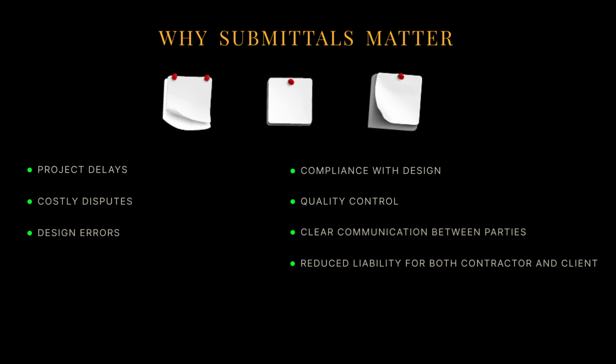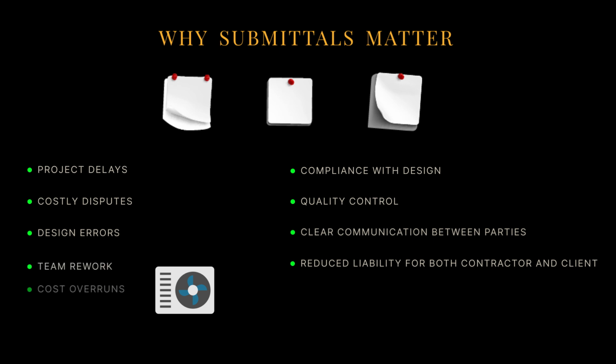Back to our hospital project. Let's say you submitted the wrong HVAC unit, too noisy for operating rooms. The design team catches it during submittal review. That change saves your team rework, cost overruns, and reputational risk.